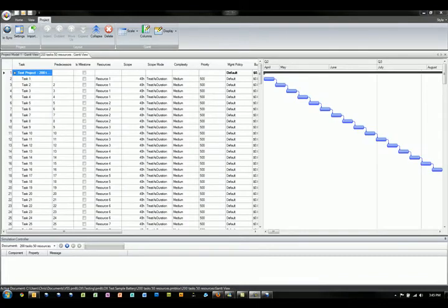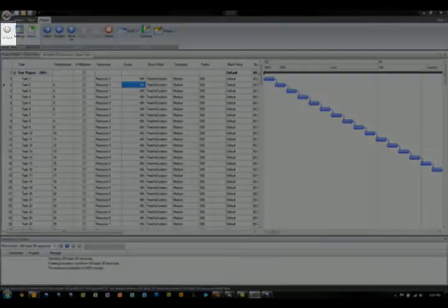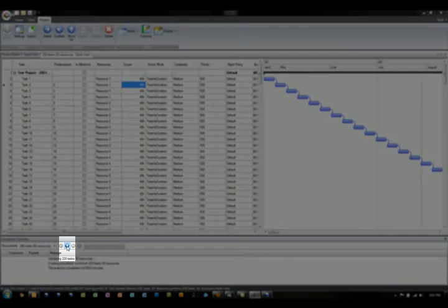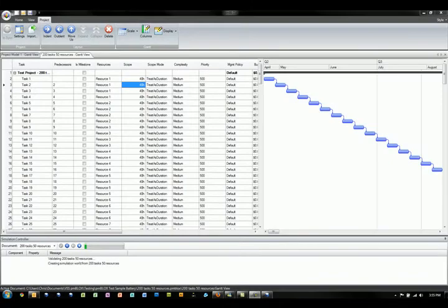Next, the Project tab is where you will do most of your work. First, the InSync button is an indicator whether or not the chart is updated. If you make any changes to the chart, you will need to rerun the simulation. When the InSync button is grayed out, that means that the data on the screen is not up to date, and you will need to rerun the simulation by going down to the simulation controller and clicking on the Run button. After the simulation is finished running, you will see that the InSync button is colored in.